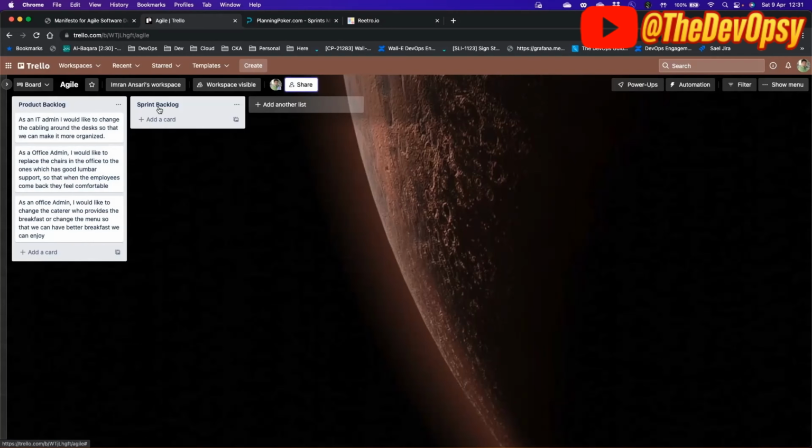Now, what happens? You are actually working on the sprint planning, and as a team, you have come here to make sure that we take items which we can actually put on the visual board or in the sprint backlog. So now tell me, first, what will you do? You will actually see how much velocity you can achieve. We will first prioritize the story points, right? And then once the story point prioritization is done, we will break them into pieces.